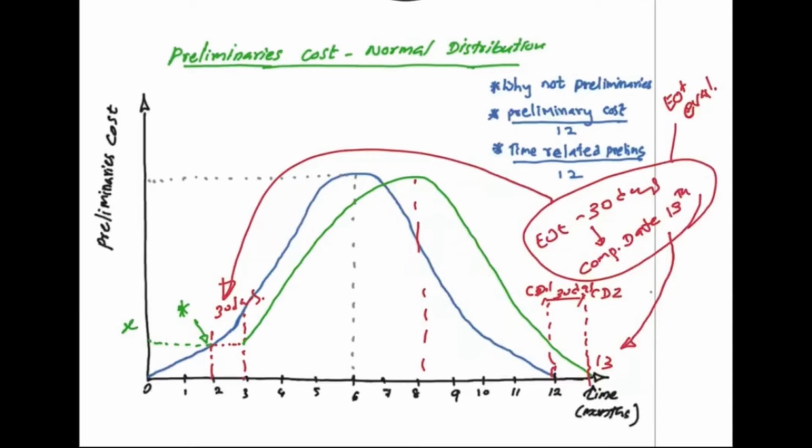Therefore, the cost of actual preliminaries may not always be X as planned. It could be lesser than that. Therefore, it is vital to have the actual records of his preliminaries cost. The contractor has to submit proper substantiation, which is a contemporary record of his delay event, to substantiate his claim.